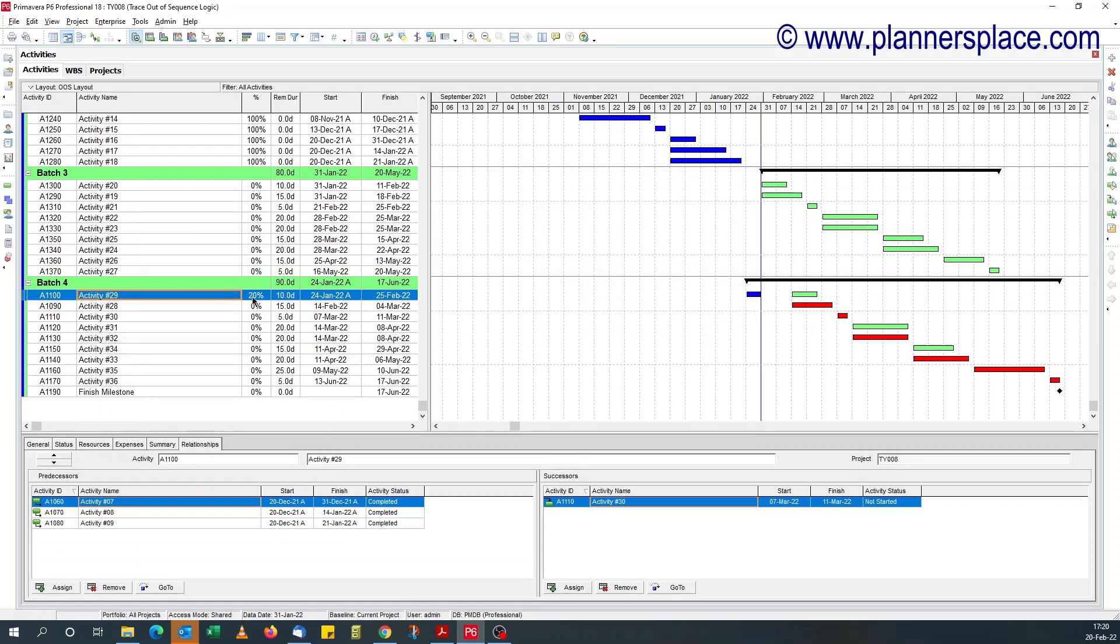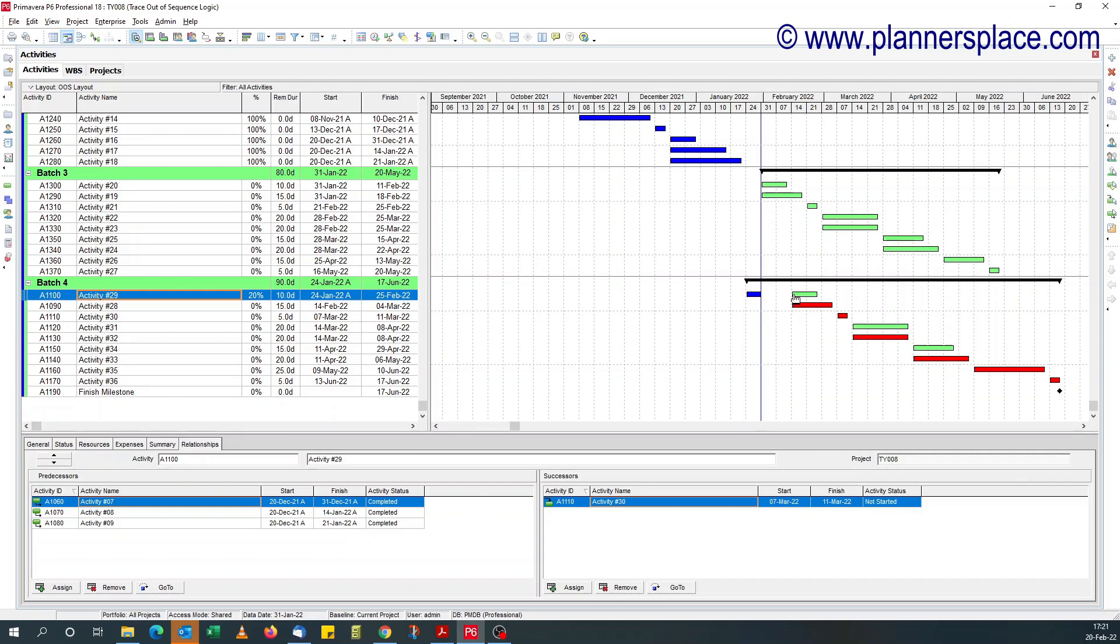So this activity started on the 24th of January, it's got 10 days left remaining duration, that should be finishing around the 11th of February and not the 25th.